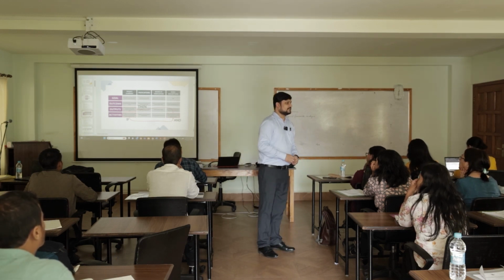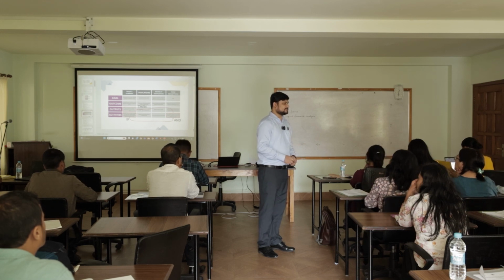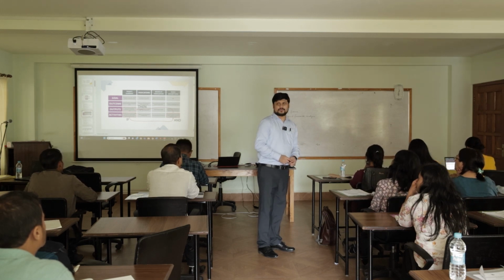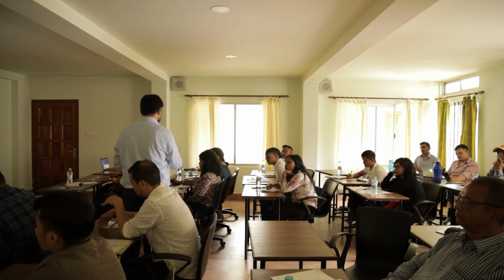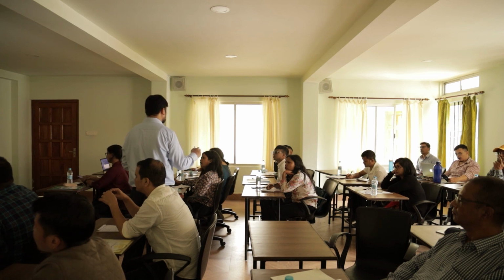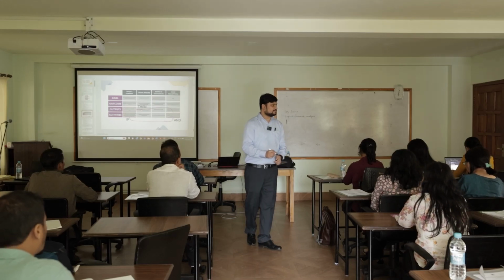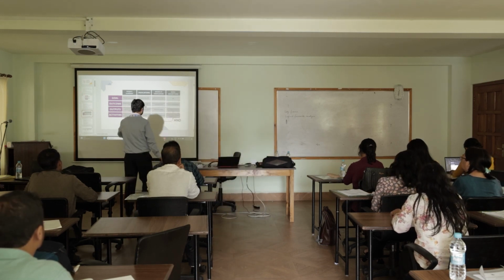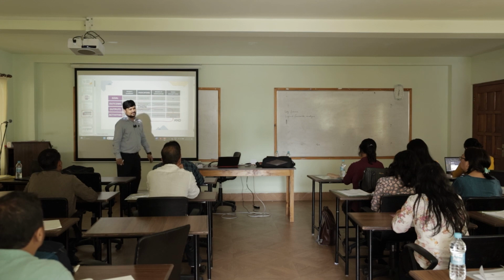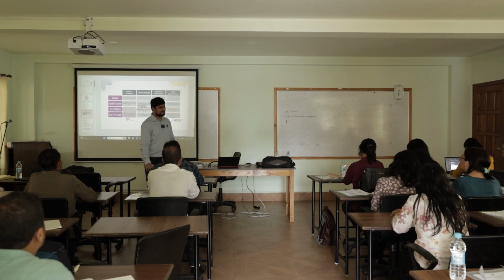Could be reports. It might be documented in certain reports. There might be a project management system, an MIS, project MIS. Maybe in certain registers it is mentioned. Every time one person goes for a counseling, he or she mentions something in that register, right? That can be done. So basically that goes into means of verification. Very simple.